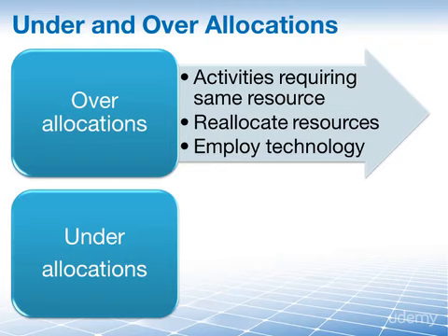If you have an over-allocation on one of your critical activities, you are probably going to reallocate resources from one of your non-critical activities, or you can employ technology in support of the over-allocated resource. A simple example is if you need to dig a hole and you don't have enough resources to do that, well, go ahead and rent an excavator to help dig the hole, which will be both faster and more productive.